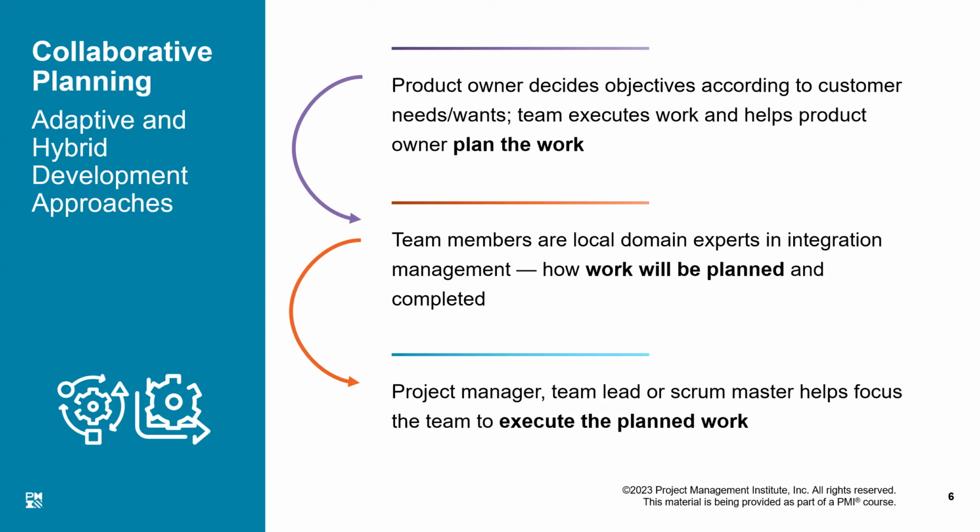So a management plan is not the detailed plan. Management plan is establishing a set of guidelines to plan that plan. So for scope, I need to first develop some kind of principles, guidelines, based on which I will be actually developing the details, right? Those guidelines are called the management plan. And then we have other details established. Those details will keep becoming part of the project documents until we reach the final shape of the scope and the final shape of any of the project objectives like scope, time, and cost. They will be very important to us, and we will include them separately as part of our project management plan, and we call them the final shape.